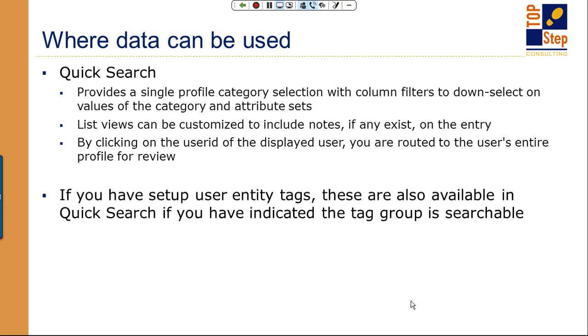Now, you can filter on availability if you choose to. We recommend that you not do that. The reason is that if you need a specific skill set, you want to see everybody who's got that skill set. And if they're on another project, maybe you can talk to that project manager, and maybe that project really doesn't need somebody of that high a skill, and you can swap out with someone else. So you want to see them whether they're available or not. It gives you an opportunity, it gives you the full picture.